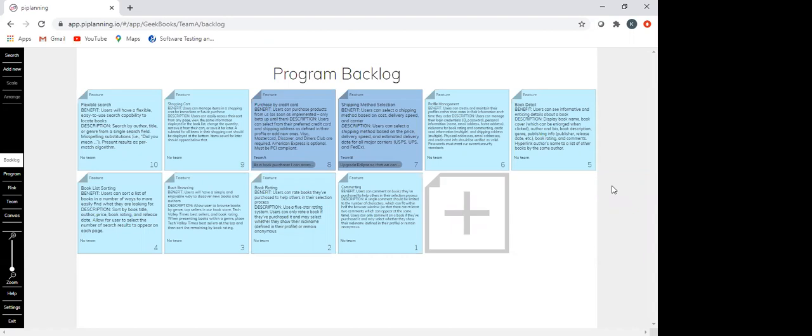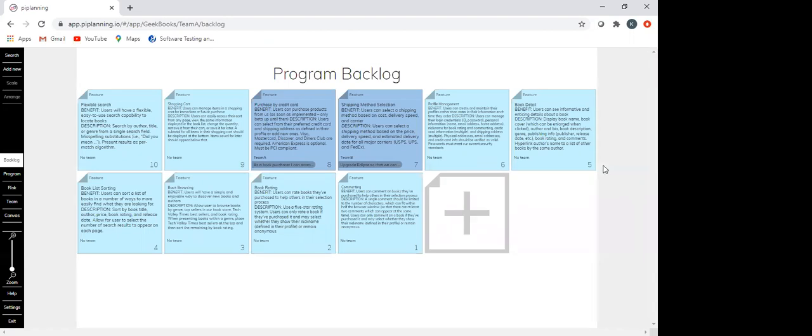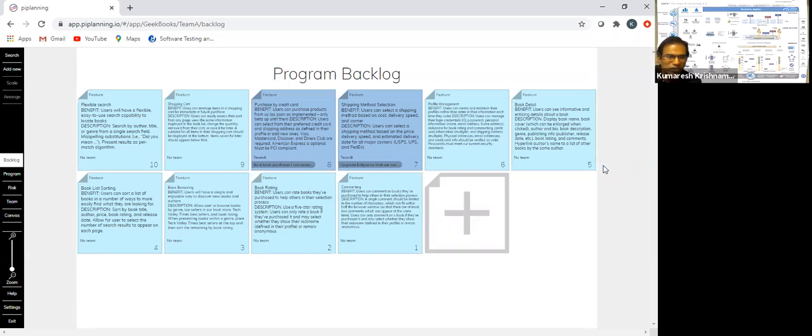Business value. Not business. Okay, not business value. That is the weight. They've weighted first. Exactly. It is WSJF, weighted shortest job first. So you prioritize these features based on WSJF. And the higher the WSJF value, the higher the priority, right? Based on that, you come up with these numbers. That is why, because the higher the WSJF, the higher the priority.